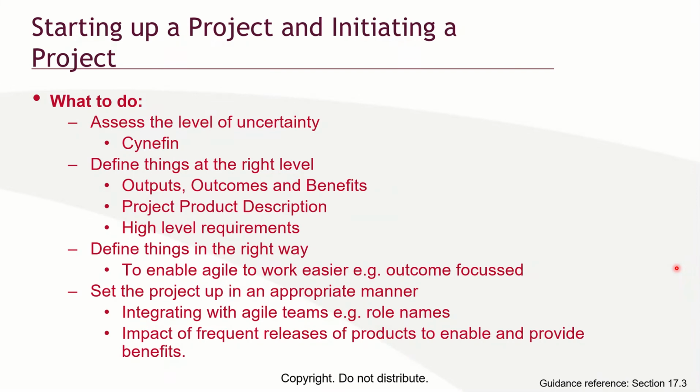So you arrange them. You define things in the right way. You set up the project in an appropriate manner. You give people different roles. That's what you do under starting up a project, initiating a project. Who are the people that will play the role of maybe electrical fittings, who will do the mechanical work, the plumbing work? All of those things are done under starting up a project and initiating a project. It's like a project plan, a detailed project plan. That's what you do under starting up a project and initiating a project.